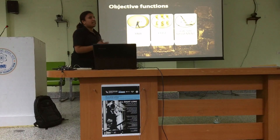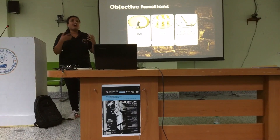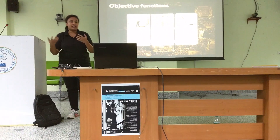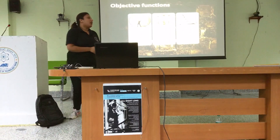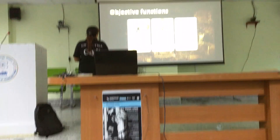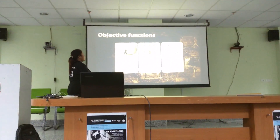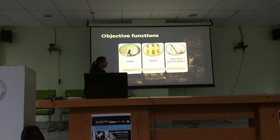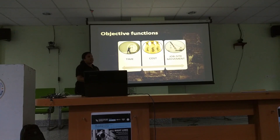In the genetic algorithm, we need something to optimize. So what are our objectives? The objectives in this research work are time, cost, and job site movement. The optimization is Pareto optimization, meaning all three are dependent on each other.